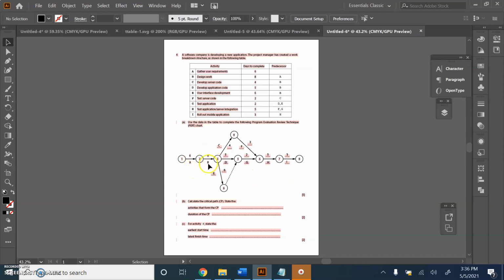Now let's have a look at these 3 parallel scenarios. Tasks C and F take 6 weeks to complete. That's the minimum amount of time required to complete those tasks. We need 6 weeks, no doubt. Tasks D and G require 7 weeks to complete.